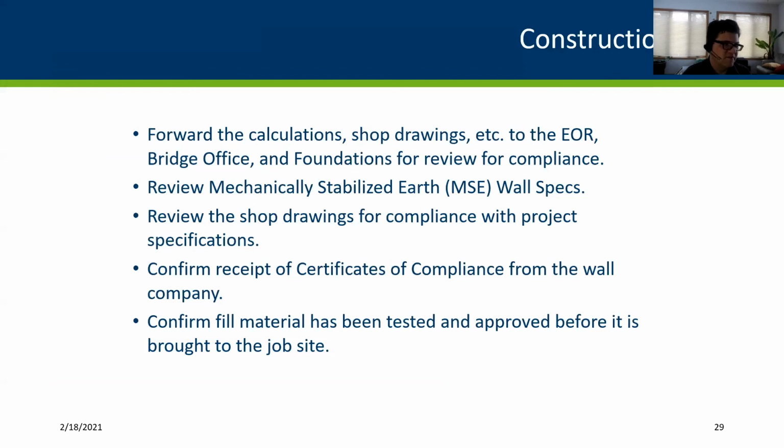I put the bridge office here because other staff could be involved, but I would also be looking at those calculations and shop drawings and making sure that they meet our specifications and that everything makes sense from a structural standpoint, that they did everything they should. And then of course there's a foundation review to make sure it's compliant with the bearing loads they're putting on the soil, that what they use for their assumptions of the in-place soil properties makes sense, and that they've established exactly what needs to happen to that in-place soil.